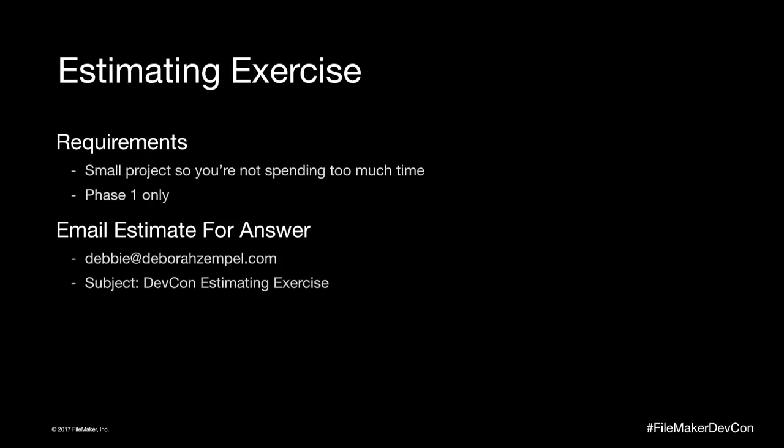And once I know that it's going to cost X amount, then I can think about, how long is that going to take me? How many hours per week can I invest on this project? And how many hours did I say it was going to take? And so then I can tell them, we'll have this done in 10 weeks or whatever. And so that goes well every time with the client, because they realize they're going to have more concrete information.